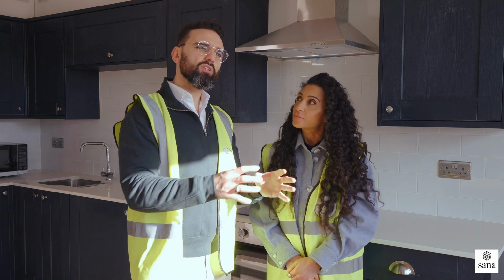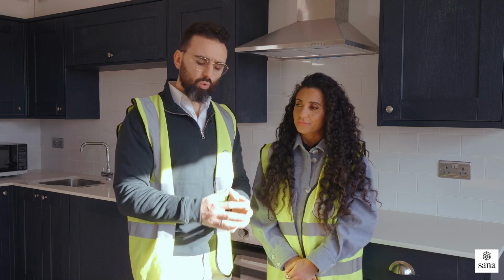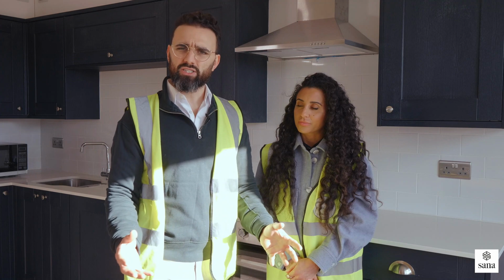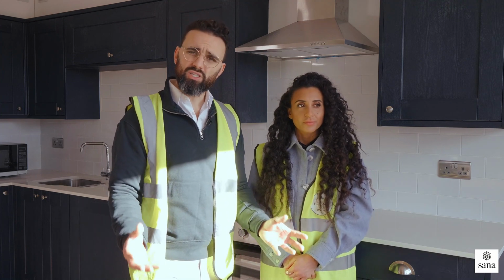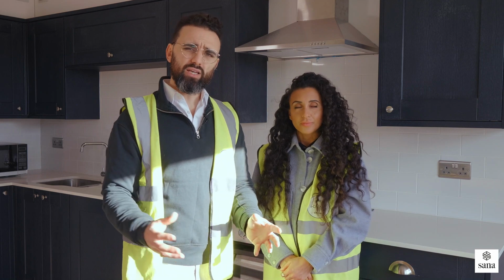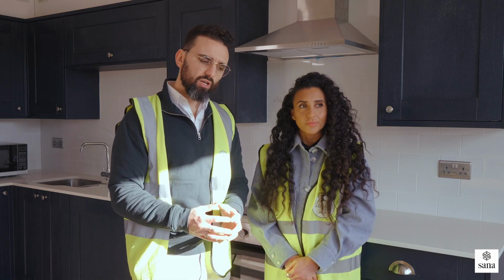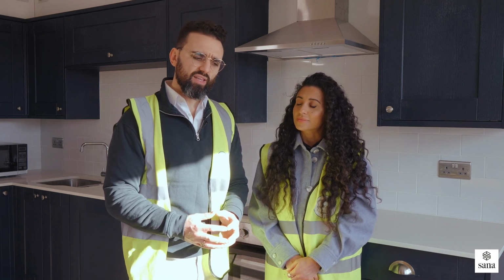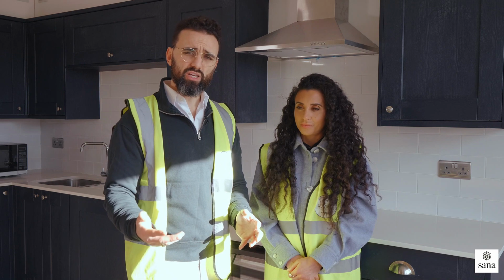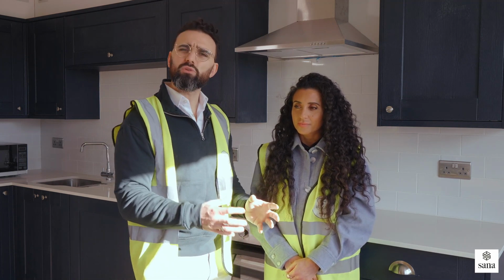Now, where you sometimes say, yeah, it's probably going to be okay with electric, people forget about the water supply and potentially gas supply, putting gas into a building. So, for example, here at Durham Court, we had 3 incoming main supplies for water, which was great, but we were installing 6 apartments into this building, and we therefore needed to install another 3 supplies to ensure that they had enough power and water into the apartments that we needed.